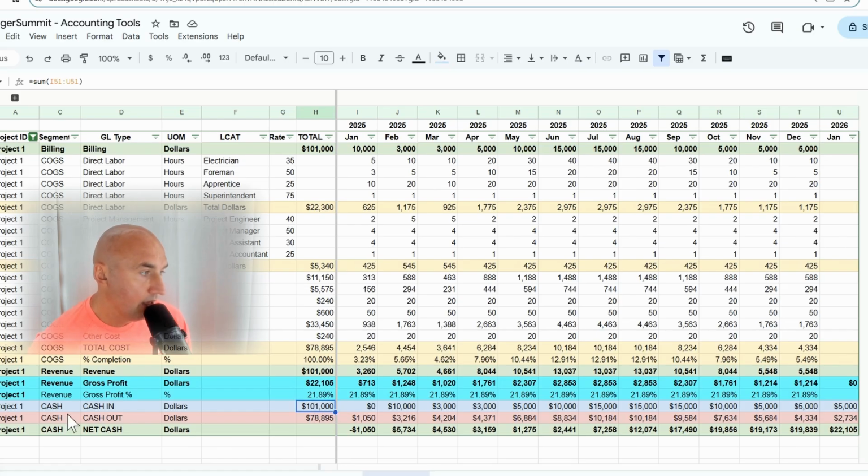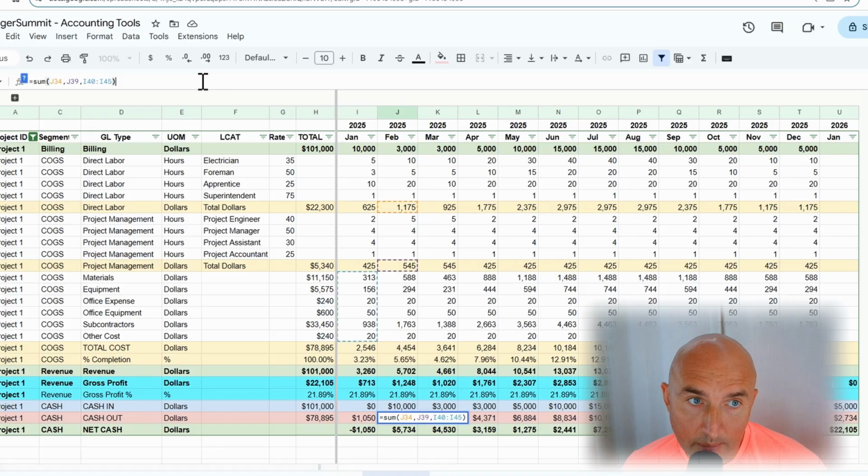Then finally, you have a cash flow forecast, which is essentially attached to the cost forecast. In this case, I inserted this rule: the billings are collected 30 days after being submitted to the client. The cash outflow basically depends on what type of cost. Your payroll, your wages, immediately cash out the door, while all the other expenses are 30 days delayed. You can do 45 days, 60 days, whatever works for you. The spreadsheet is pretty flexible.